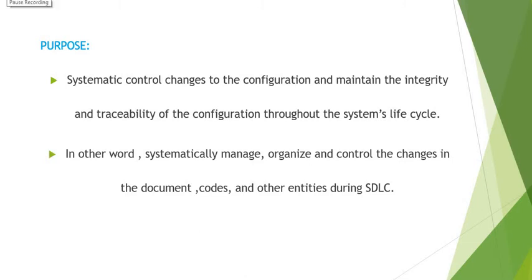A software baseline library is established containing the software baselines as they are developed. Changes to baselines and the release of software products built from the software baseline library are systematically controlled via the change control and configuration auditing functions of software configuration management.